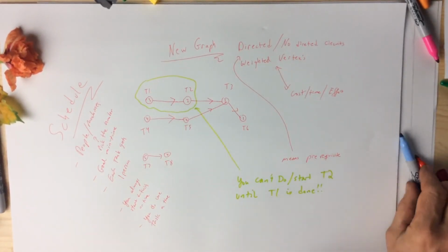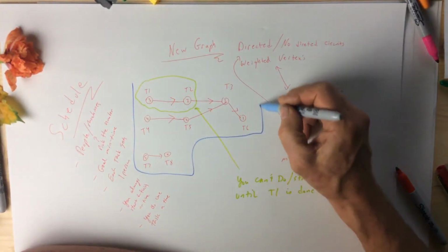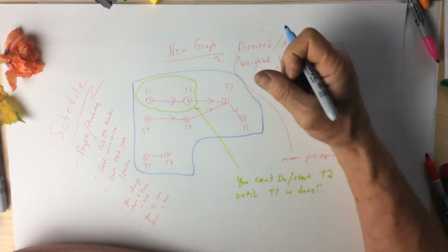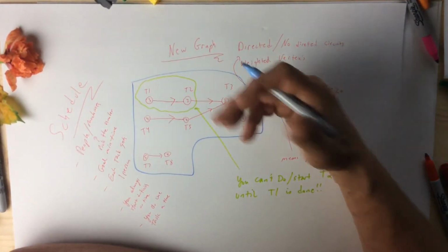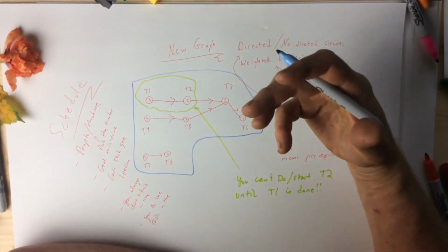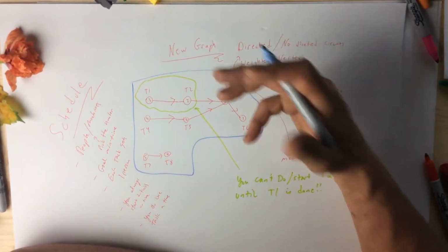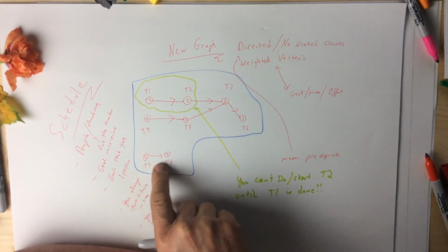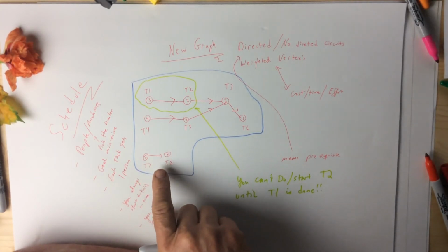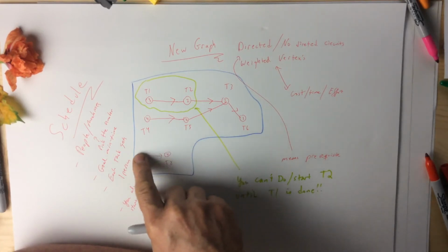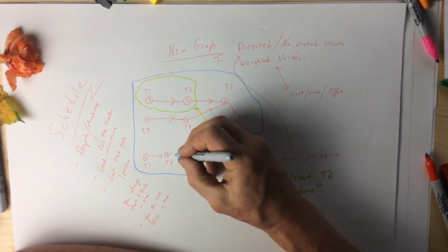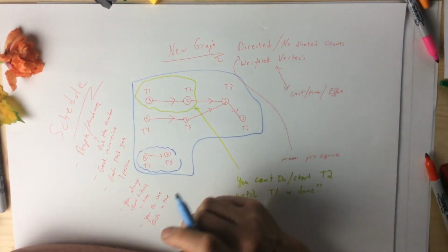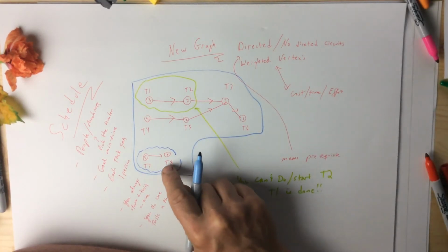We're going to try to schedule this. But the first thing we want to realize is that when we have a graph like this, it kind of would be nice to know what's the earliest, no matter how many people we have, we can get this done. What happens if we got to get this job done? Spacecraft's going to launch, or the road is going to open, or the army's going to invade, or the snow is coming and we've got to finish the road. I mean, there's a million reasons the jobs have to be completed, and you might want to throw more people at it to get it done. Well, I want you to notice, if you look at just this little bit right here, this says T7 must be done before T8, and then T8 can be done. It's a total job of these two things of 9 hours. So right now, because of this single path in those two jobs, it looks like 9 hours is maybe a minimum time to finish. It's got to be longer than that, but 9 could be the least.